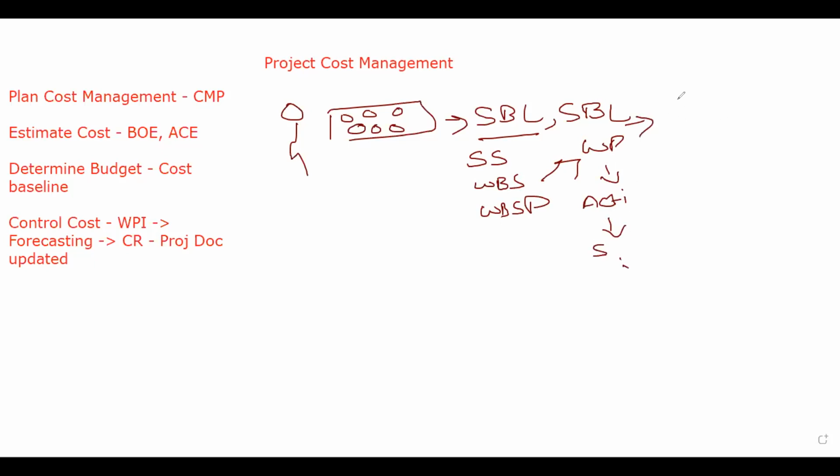So today, on that basis, we are going to start the cost. Everything is done, now we are doing the costing. This management plan will always establish how things need to be done. So how we will calculate the cost, how we will estimate, how much rough order of magnitude estimates will be required, what the procedures will be, how we will set the payment method. It could be 0 to 100, 80-100, or 50-50, or an advance payment. What will be the project measurement criteria, how much delay is accepted, how much is required to be done, and so on.